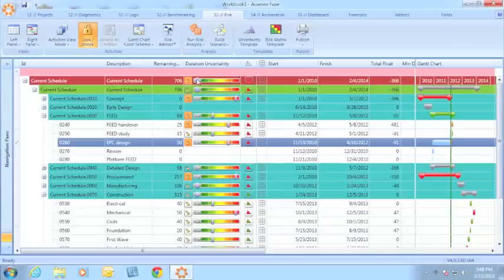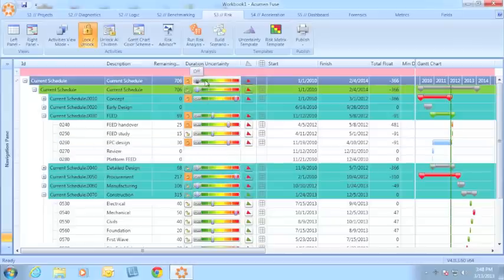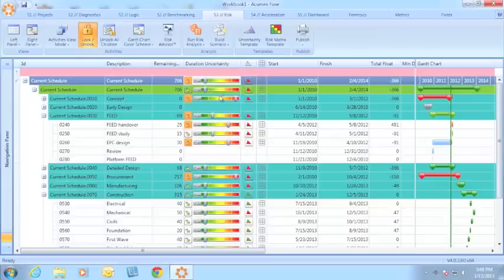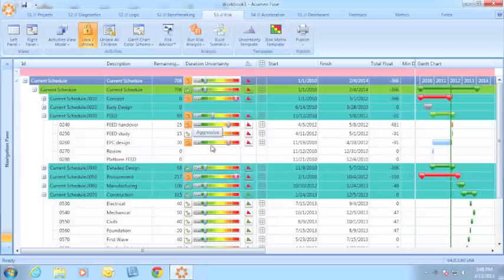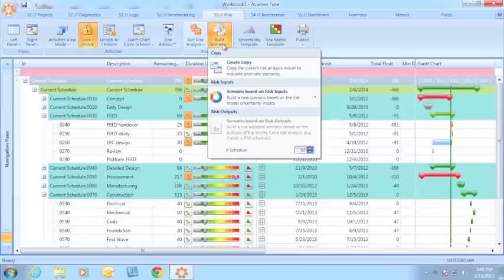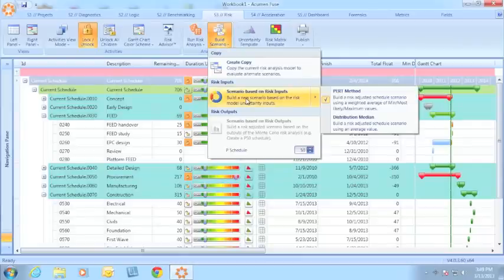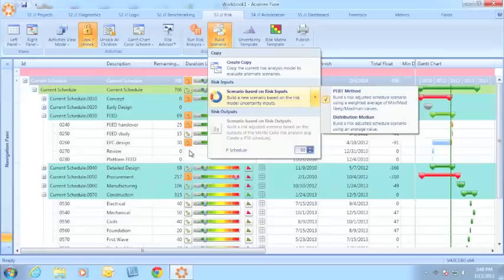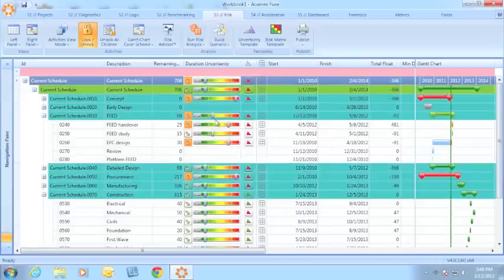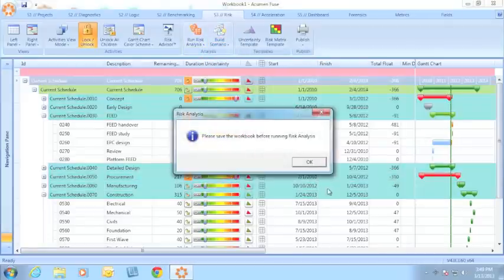We've gone through and risk loaded most of our schedule. Let's go ahead and finish it up. At this point, I can use the new ability to build a schedule scenario based on either my uncertainty inputs or I can run my risk analysis and build a schedule based on any p-date. I have the option to build scenario based on these inputs which will give me a schedule option which takes into account my uncertainty assignments or I can run my risk analysis.